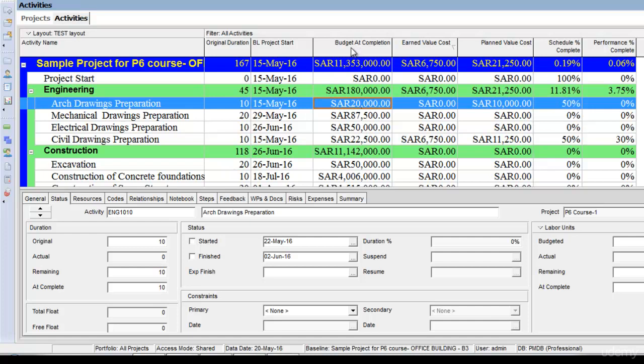In order to understand and calculate earned value calculations, we must have assigned resources to the project and we must have a budgeted completion. We must also have assigned a baseline, because the schedule percentage complete is calculated from the baseline date.